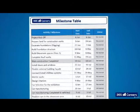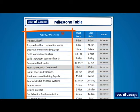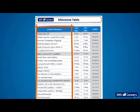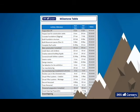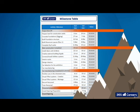Note that we said milestones. Milestones, as the name suggests, are important achievements throughout the project. They are marked with a zero duration on the milestone table. You can see here, main construction completed. Personnel preparation completed. Grand opening. These are some of the Lamberari project milestones. Awesome. We have officially covered everything a project manager will need when scheduling their project.